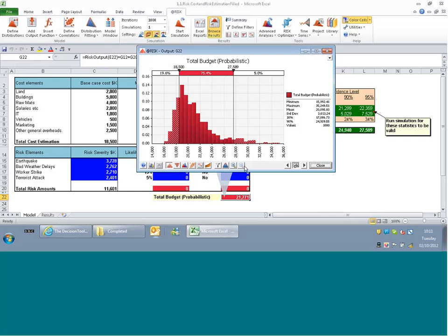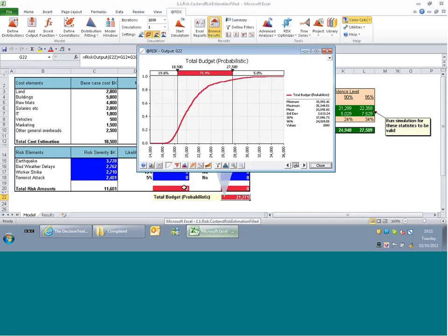And so that's what @Risk is going to do. I think sometimes it's quite helpful just to show you what's going to happen at the end of the demonstration, so that you're aware of what's going on as I'm building it up and talking about it. So it's really about taking a deterministic or static model, adding in these things called Monte Carlo probability distributions, running a simulation, and then looking at the results.